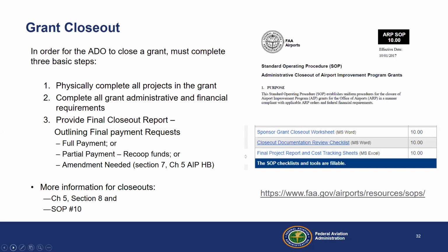We do this because if there is money left over in the grant, we can put that back into our coffers. We can make it work for us. If you use your money and you close it out before that money expires, you can use it again. We can put it on a new grant. If the money has expired, it comes back to us and we can recycle it. It might not necessarily go back to you, but we use it for amendments.